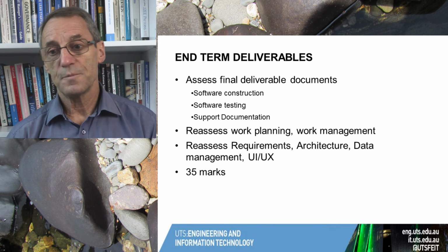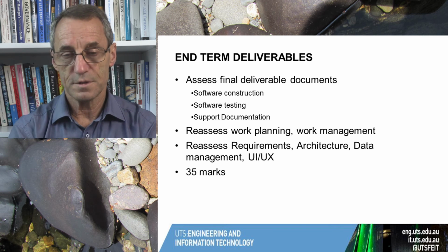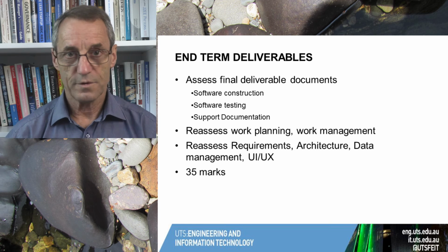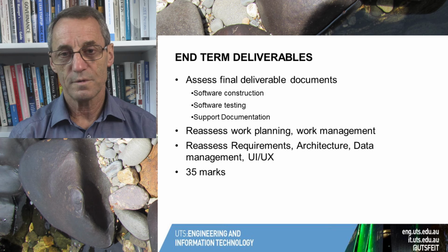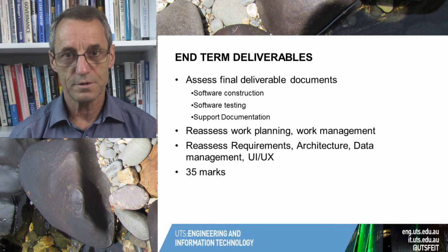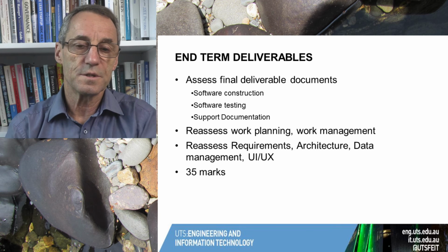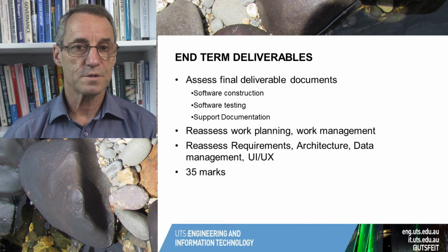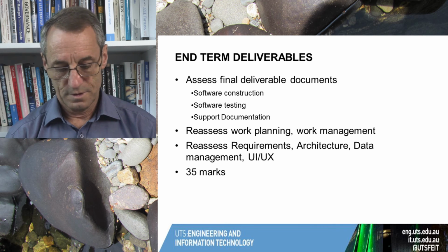Now the purpose of each of these is explained during the subject, but essentially it's not simply have you tested it. There's a bit more to it than that. You have to have a test strategy, a test plan, and you have to have your defects under control and show that you actually know what you're doing about testing. And similarly, documentation is the support documentation for all of the people who are going to be inheriting this system. That is the users, the installers, and the maintainers.